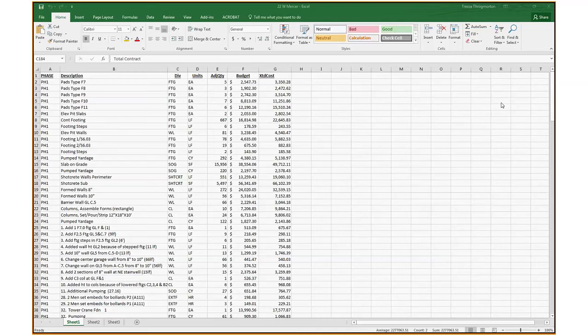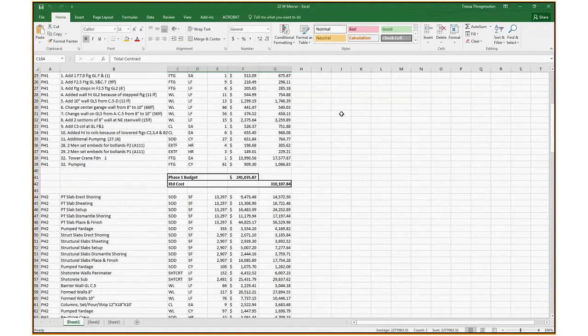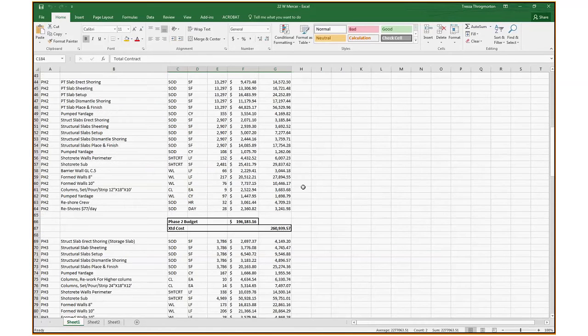So through the estimating platform, the estimator is going to provide the accounts receivable this Excel sheet of the data, including the phase, description of the line item, division, units, quantity, budget, and extended cost. And it'll be broken out by phase with subtotals per phase to both ensure that data is moved correctly from PCMX and that it matches the budgets that should be entered into Sage.